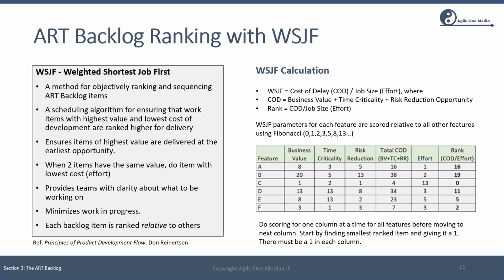So if a team has 10 features going into a PI, what we don't want to see is 10 features in progress all at once, and ending the PI with 10 features 90% done. So this provides a way of sequencing the work so that the highest value is de-risked to a certain extent. And then each backlog item is ranked relative to the others.